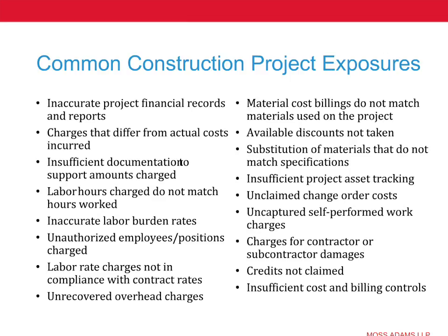The next item I would mention is where charges differ from actual costs incurred. This is when you're billing based on actual cost incurred. There are a number of subcontractors, and other organizations as well, that likely deal with lump sum contracts on a regular basis. And invariably, when you land a cost reimbursable contract and you're used to doing work on a lump sum basis, you're getting paid, and I would think the vast majority of you know this, based on the percentage of work complete against the schedule of values items. When you're doing work on a cost reimbursable basis, that is not how you should be billing, and that's not how the cost should be coming across.